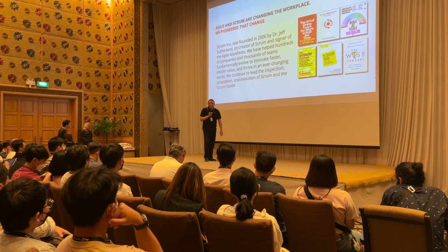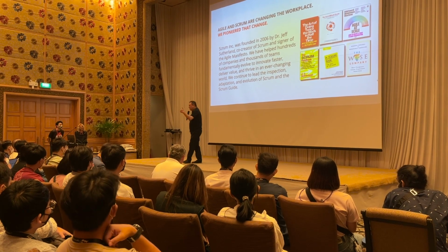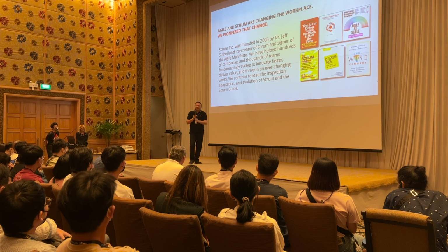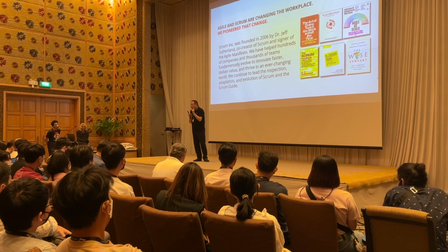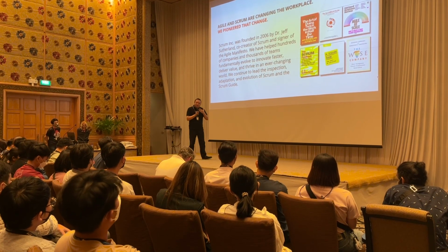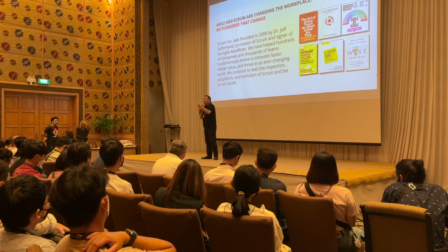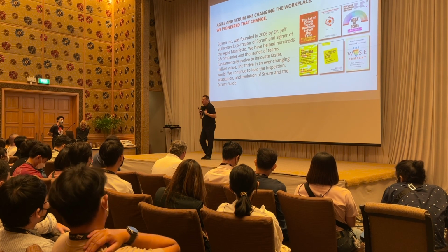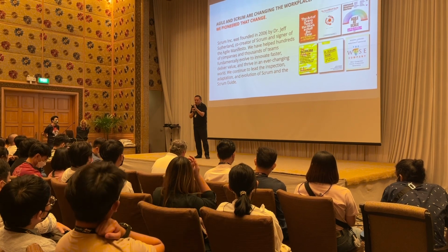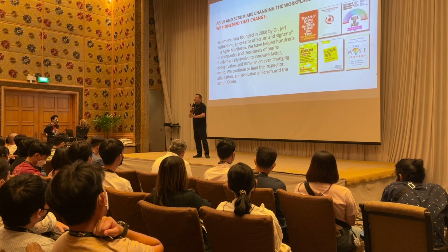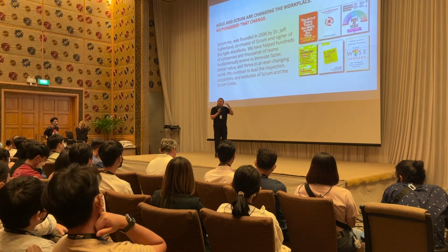Yeah, so team structure is a really important one. So you really want to have a small team and stable team. By small team, Scrum supports 3 to 9 people. You can pick any number of people in your team, right? But the best number is 4.6. Why is 4.6? Because as Jeff traveled around the world, he looked at the best performing teams, right? And then he told us, the Scrum@Scale trainers, that from what he's gotten, the 4.6 number is the best number for a Scrum team. That means 4 to 5 people. So as you are able to configure 3 to 9, your best configuration is around 4 to 5.